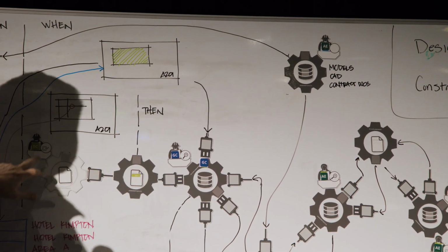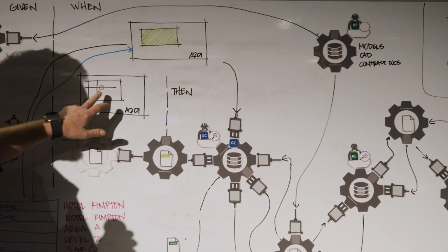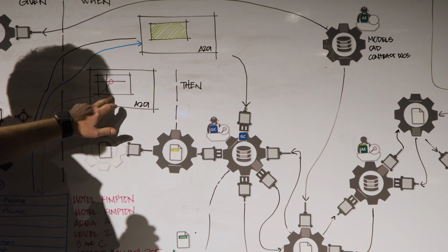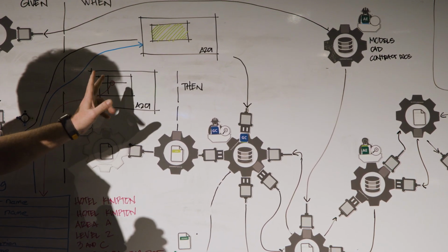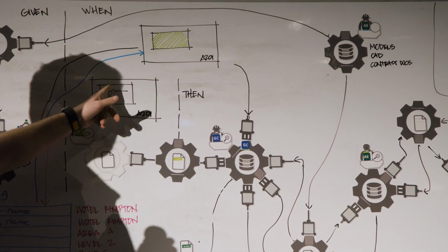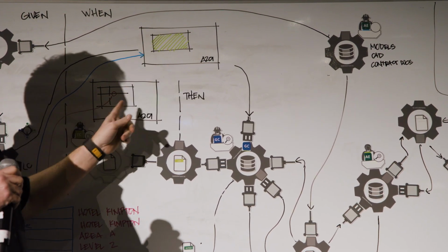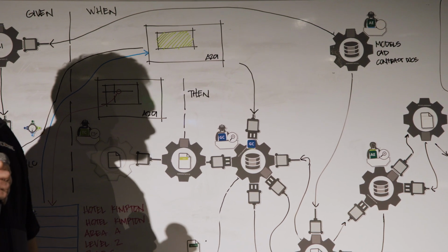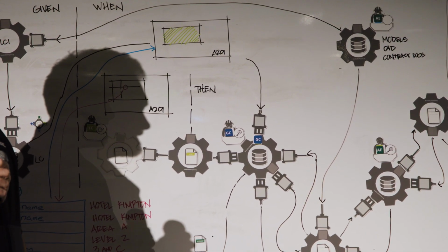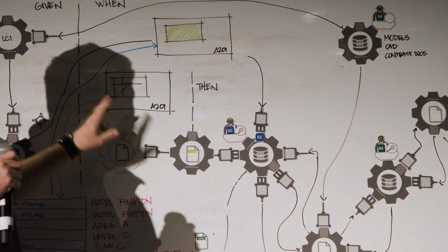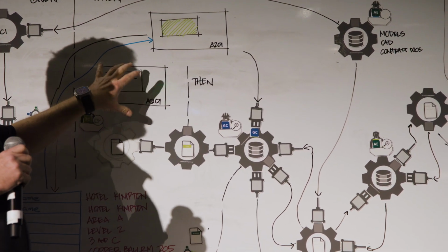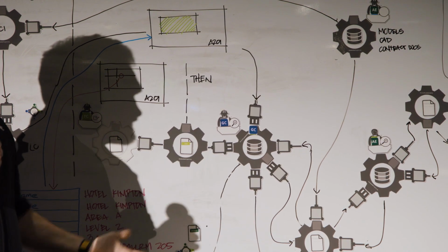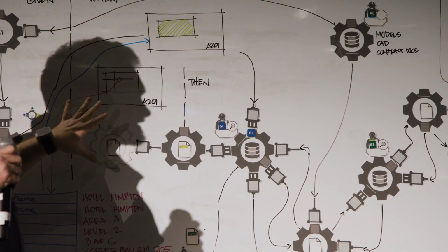So when I'm on the job, right, I'm creating an RFI. More often than not, the RFI is created from the drawings. I'm dropping a pin, right? We're assuming you're just going to drop a pin. When I drop that pin on this drawing that's been enriched, that pin now has location, right? And then from there, this is where it starts helping things out. Locations are also drawings, right? Where is this happening on the drawings?